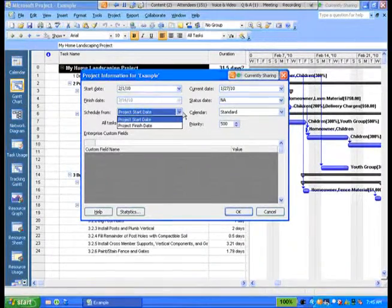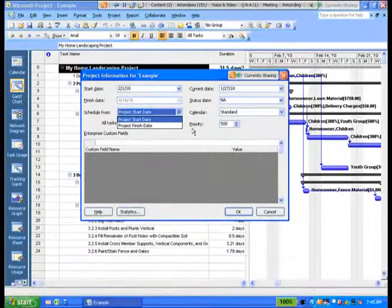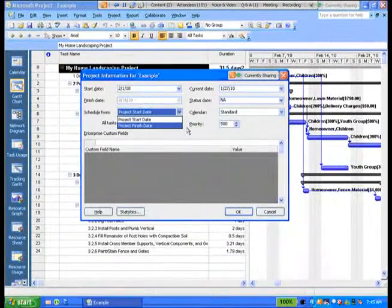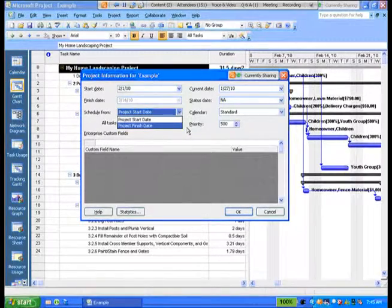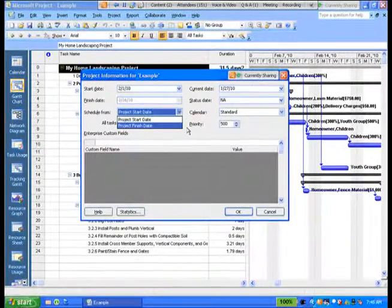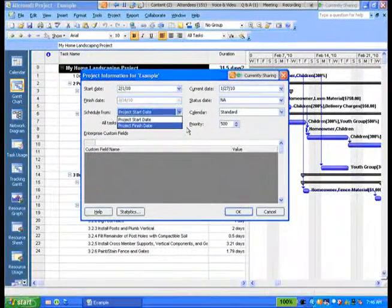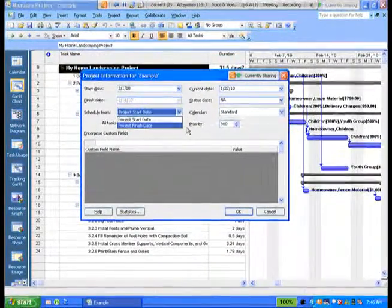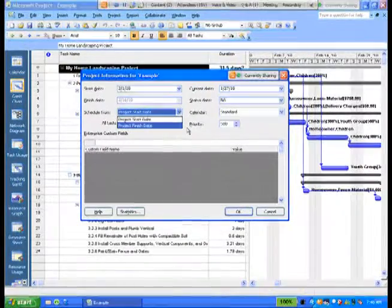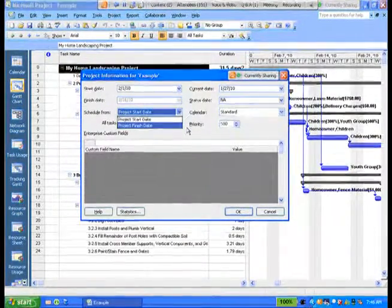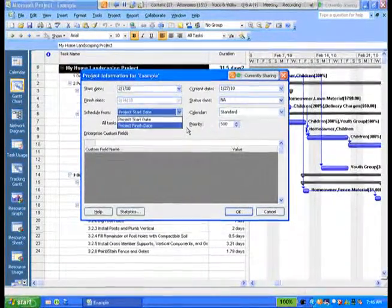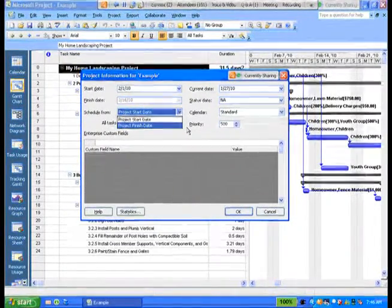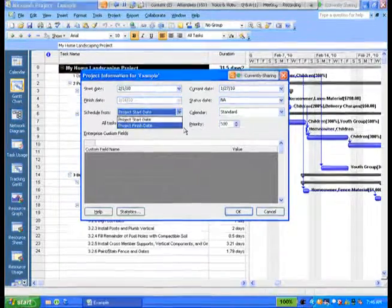There is another setting, and that's to go from the project finish date. I don't recommend that you start off using the finish date of the project as your calculation. Now, the reason why is that if you're calculating from the finish date, tasks are calculated to start and finish as late as they possibly can. So this second feature, the second option, is going to give you less flexibility than the previous option.